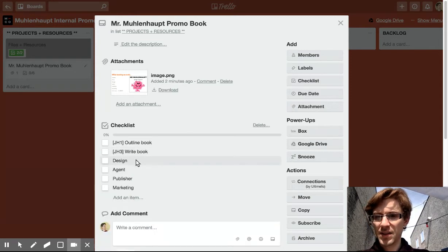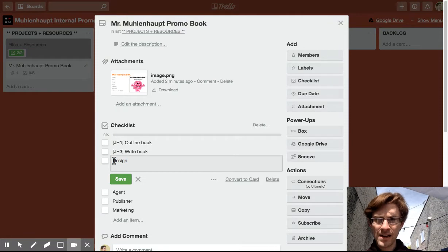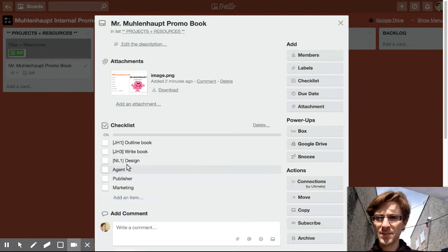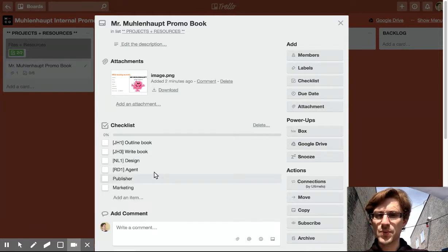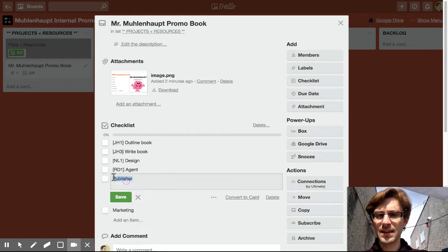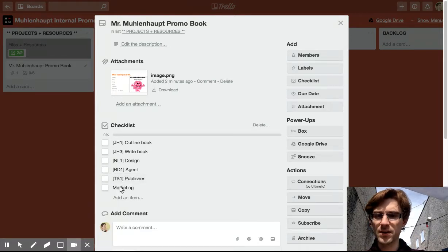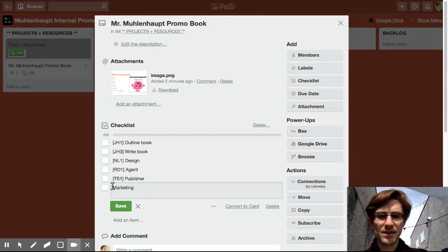I'll be a little unreasonable with time here, but for design, I want some scribbles done, and I want them quick. So we're going to give Naz a quick design, because we just want that cover to be nice and scribbly. We need an agent, so I'm going to find us an agent, and I'll take less than an hour to do that. So we always round up the number of hours it's going to take instead of rounding them down. And then for publisher, I'm going to have Todd find someone, because he's written some books before. Not really, but he's connected.